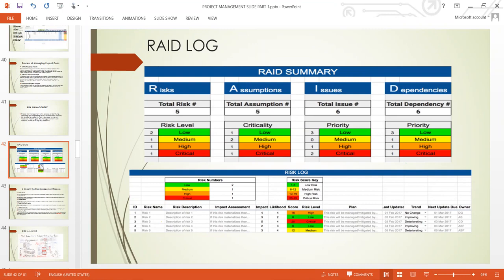You have a green, which is low, the risk is low. You must prioritize the risk according to the risk level. Is it low? Is it medium? Is it high? Or is it critical? So critical risk must be handled with urgency, and you must give it all the attention. High risk is equally dangerous. It needs to be handled very swiftly as well. And medium risk, not that you ignore it, but you don't need to handle it the way you manage a critical one, and low risk are some of the risks. Yeah, you need to still address it. You take your time to study it and deal with it.